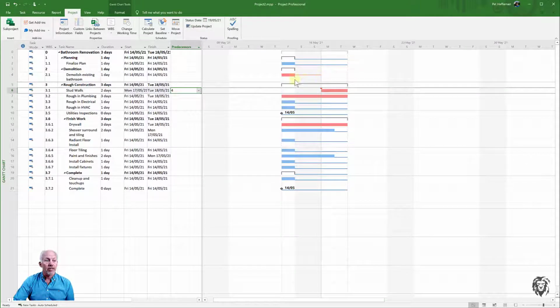Over on our Gantt sheet, we see this link. Now, the only reason why there's a gap in here is because Saturday and Sunday are non-working days, but otherwise it is nose to tail. So when one is finished, we are free to start the other task. And because it's automatic scheduling, you see that it pushed it out to do that. Now, the way I added that was simply to go on to my Gantt chart. I'll do it one more time.